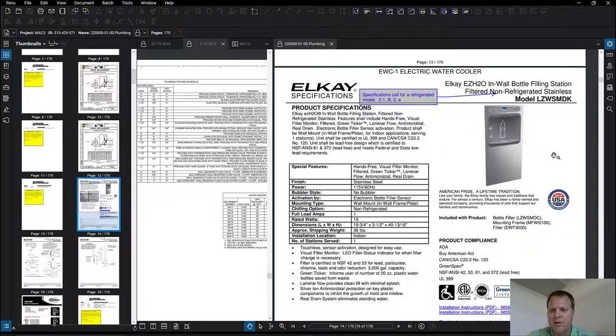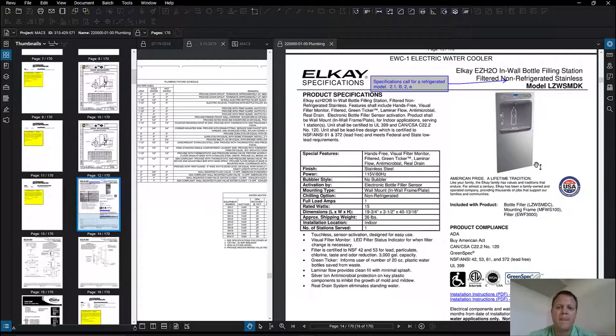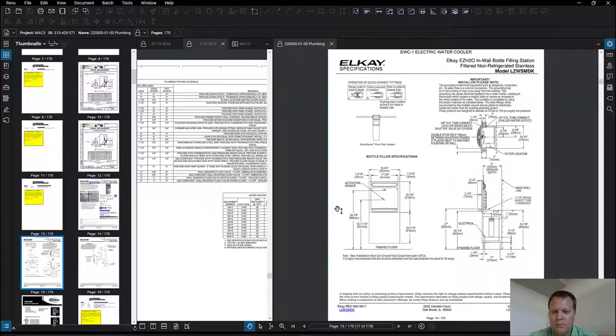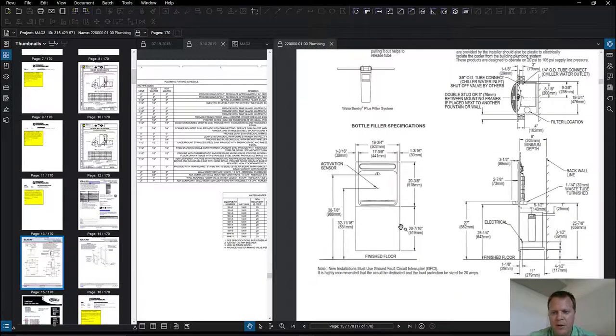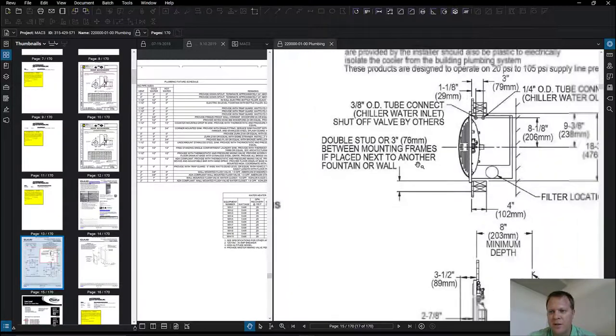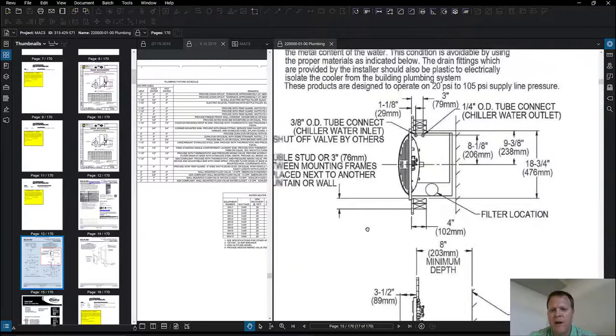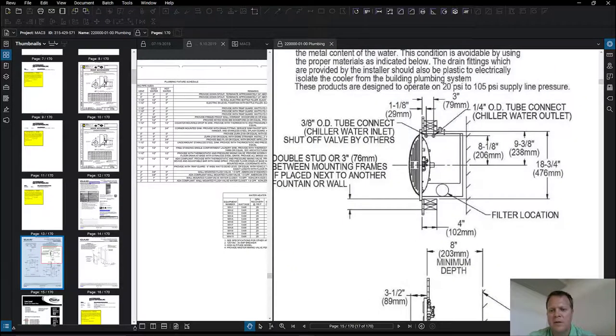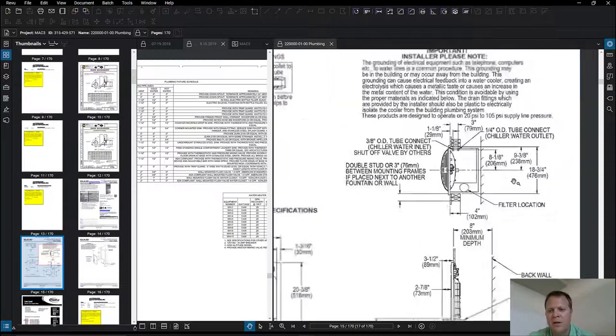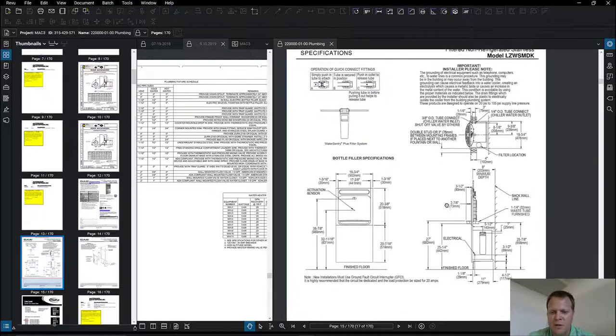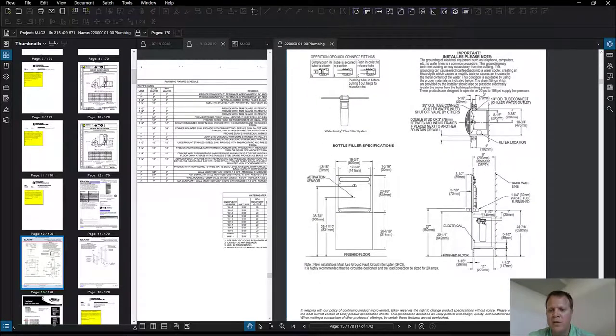Okay, cool. Now everybody's seen one of these things, I'm hoping. But that's what they're going to provide for the water cooler. More information about the water cooler. This is super good information to have. We need to coordinate these locations. Look at this. This is the information we need in order to frame it right. Right? So this water cooler actually sits back into a little cubby, and the water line's here, and it's showing the framing and how big you have to leave the opening. Anyway, there's all kinds of really good information right there on what we need to do,